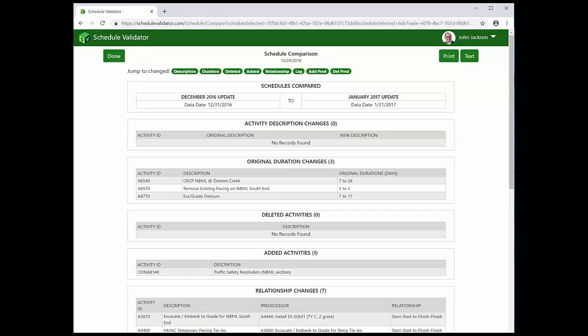If you're attending today and you're a contractor, one of the issues you definitely want to avoid is what they call abandonment of your schedule. So as much as possible, you want to maintain that original schedule as you go through the update. Make changes, make adjustments. You can even adjust that logic, but avoid changing the scope, like changing a description for an activity. This report will show activity descriptions. This one doesn't have any in there, but if you change a description, now you're comparing apples to oranges in some cases. So just be very careful what you're making.